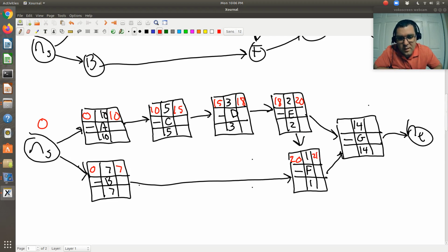Okay. And then if I look at G, G has an immediate predecessor of both E and F. Okay, so again, I'm looking at the largest, the max of those earliest possible finishing times. So that's going to be due to F. So the earliest possible starting time of G is 21, has a duration of 14, so that's going to be 35. Okay, and then I just go from G to my terminal node. So this whole process will take 35 days.